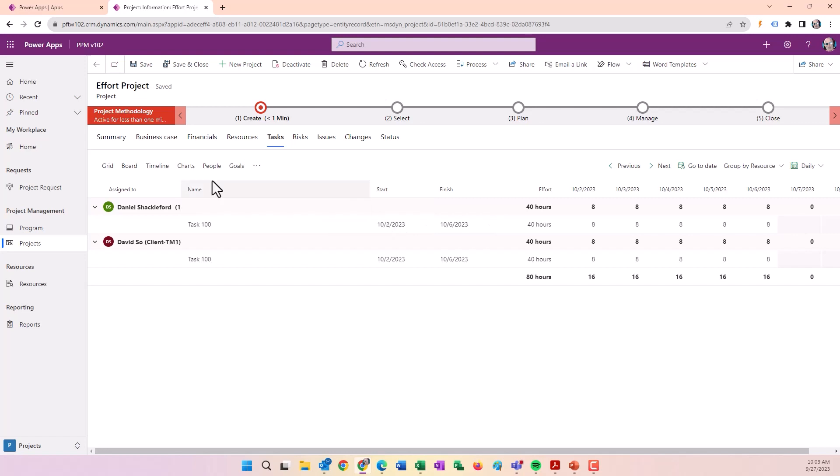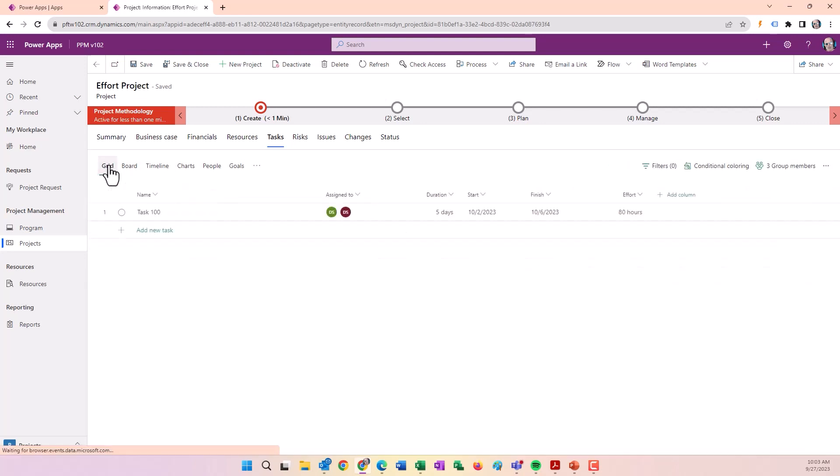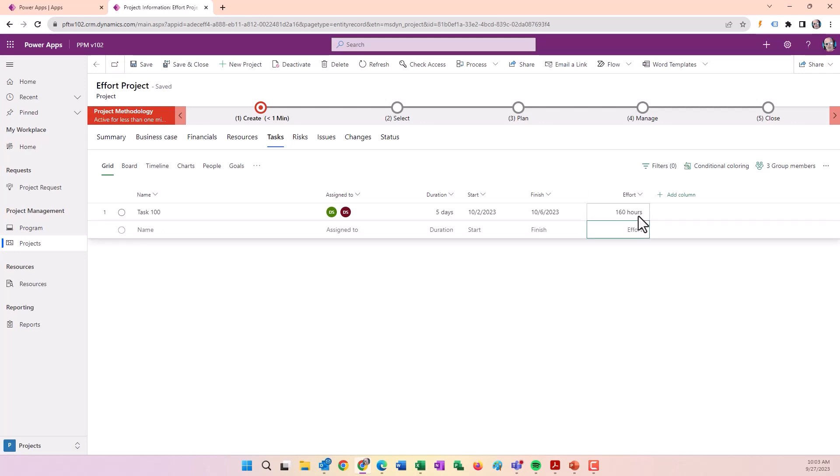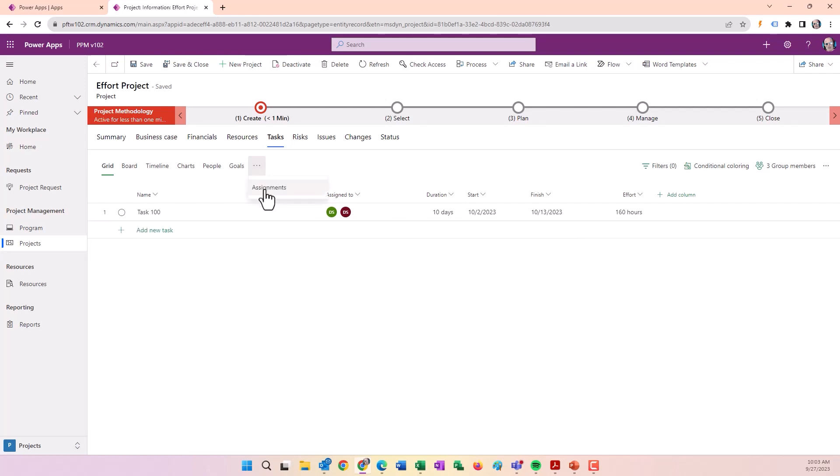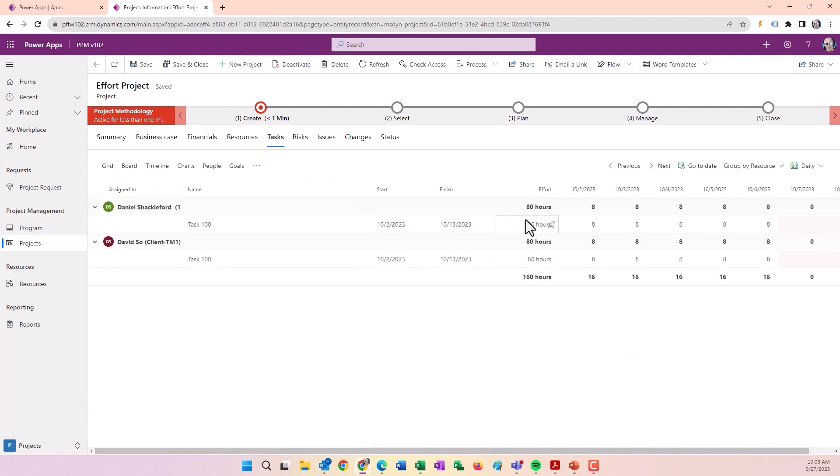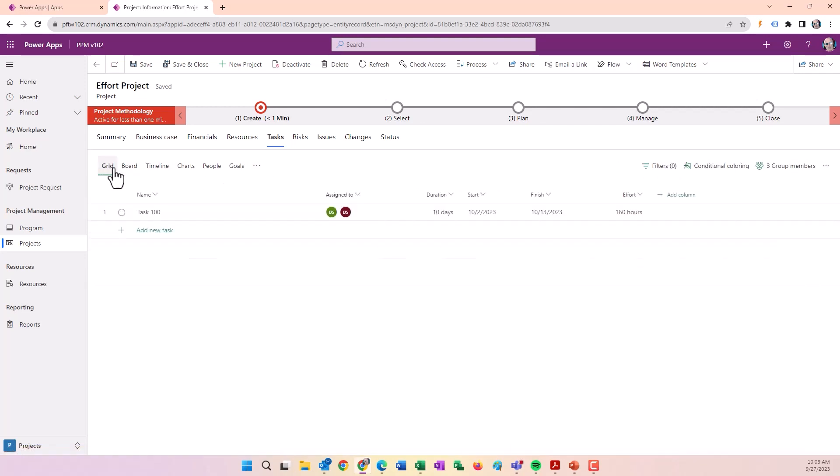If I change this to 160 hours, it's going to increase the duration because it'll take these resources twice the amount of time to complete the work. Those two resources are working full-time over the course of two weeks to complete it.